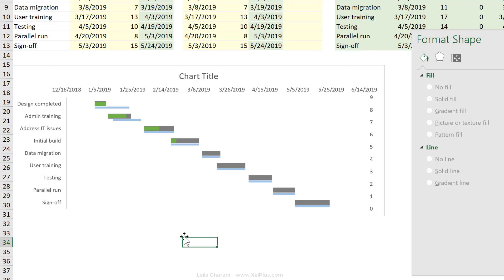So just quickly by looking at this, I know that I completed the first task much faster than I planned. And it looks like I'm going to complete the second task faster than planned as well. Now let's do our last task. And that is to add a line representing today's date.